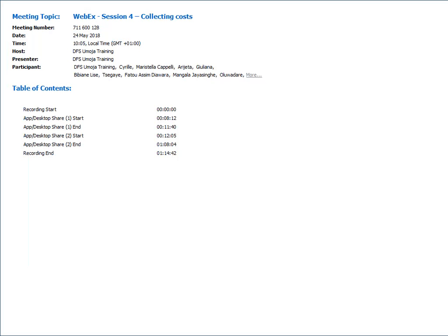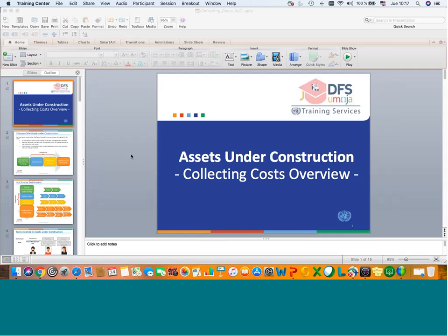Thank you, David. So let's continue with the session of today. As David said, the project needs to be in status released, budgeted and released, and only then can we start charging cost to the project. Let's begin with the session. Let me share the screen.